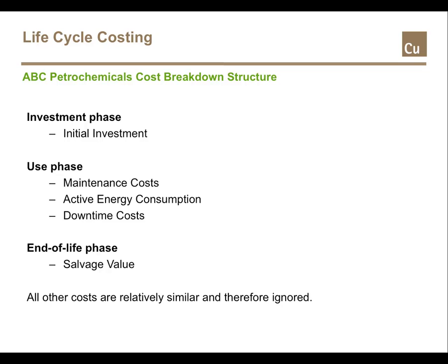Leonard has identified the following cost components to be relevant in his case: the initial investment, maintenance costs, active energy consumption, downtime costs, and salvage value. Since all the other costs are about the same for the three options, Leonard will not bother about them.